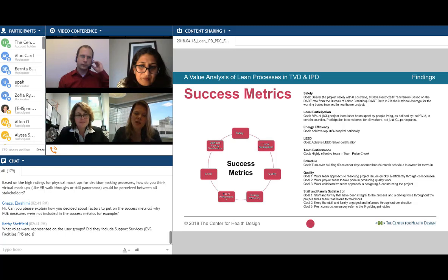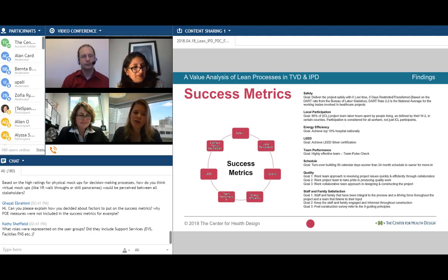The things we did post-occupancy were done at a different time. Ideally, I would like to travel back in time and add those to the success metrics specifically. As we continue to do projects, one thing we didn't mention is that many times on these types of projects, our compensation is based on how we perform. So I would tie the POE to these metrics, so that it's not just based on costs and the things we can think of. It's actually based on post-occupancy.